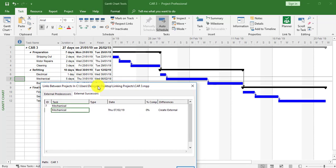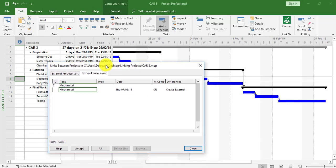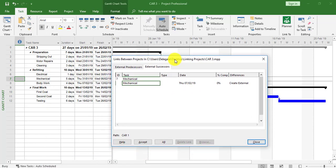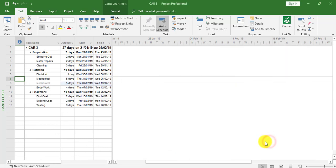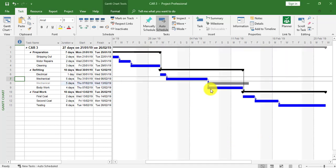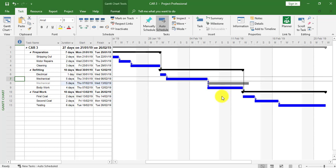We can see there's no gray bar yet and no gray task, but as soon as we click all and now close, we now have the link following through. Now Car 1 and Car 3 are linked with a Finish to Start link.